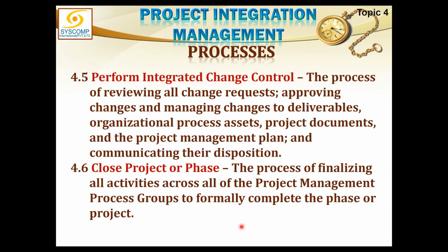And all these change requests are then processed here. They are approved or rejected, or whatever decision is to be taken on each one of those change requests is taken here. And if a change request is approved, then accordingly, if there is to be a change made, the update made to the project management plan or any of the project documents we created earlier in the planning is then done only after the change request has been approved.